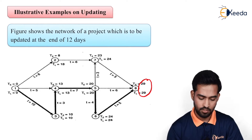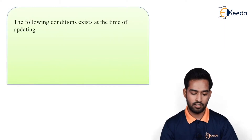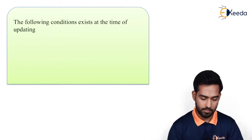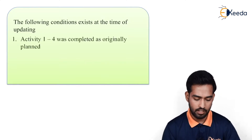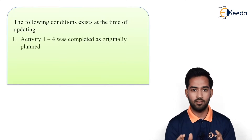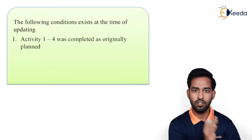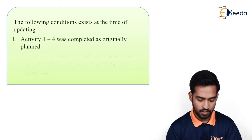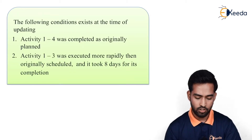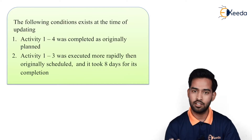How is it done? The first step: the following conditions apply at the time of updating. Activity 1-4 was completed as originally planned because it finishes well before the 12-day mark. Activity 1-3 was completed more rapidly than originally scheduled and it took 8 days for its completion. Activity 3-4 commenced following the completion of activity 1-3 and was completed at the end of the 11th day.